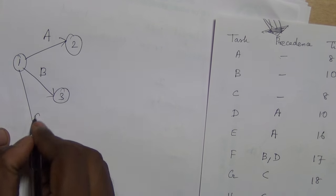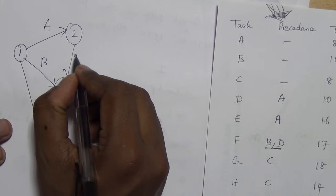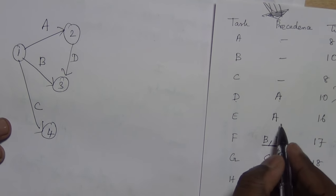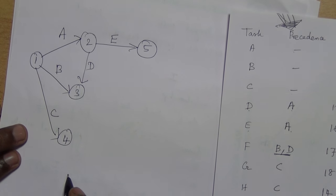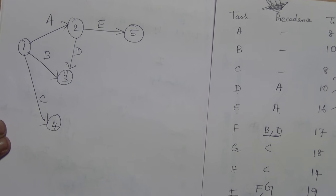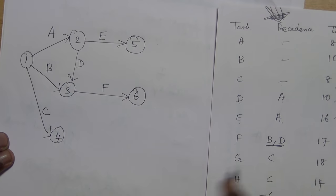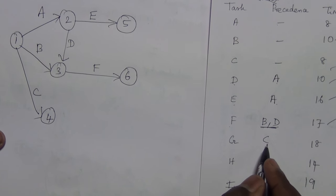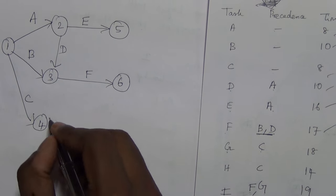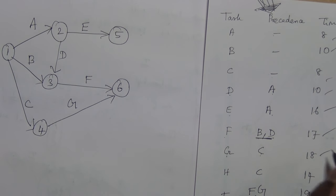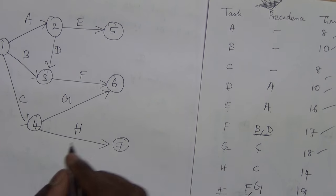So we draw A, B, C. After completing A we have D, but D is combined with B so we combine them with D. After A we have E — E doesn't combine with any of these activities so we draw E separately. Then after B and D we have F. G is combined with F, and after C we draw G by combining with F. After C we also have H, and after F and G we have I.